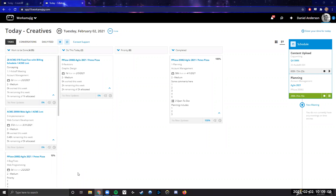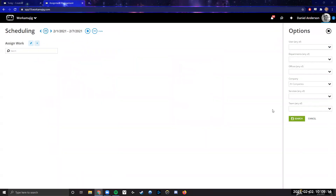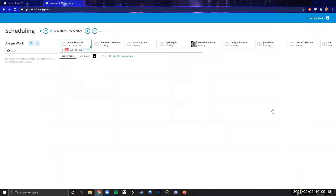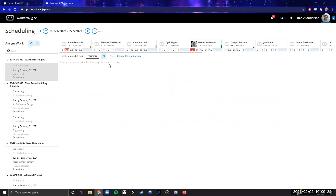On the assignment management page, if you click the 'Meetings' tab, that's for resourcing purposes. It lets you see, for a specific day, whether a person has a meeting — for example, on Wednesday at 10 a.m. That's actually a major reason we ask you to sync your calendar with Workamajig, so we can resource meeting detail for you. This will show details of any meeting on the Workamajig calendar that is marked as 'block off.' We resource the time for any such meeting, and those typically come over through a sync with Google or Exchange calendars.